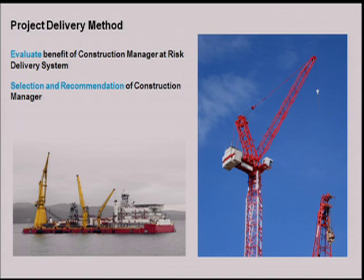So with that, an RFP was issued and 10 firms submitted their qualifications. The design team participated in the evaluations and the interviews in an advisory capacity, leading to the selection committee's ranking of Skanska as the highest ranked firm. Then on August 2nd, City Council approved the ranking and authorized staff to negotiate an agreement with Skanska, which is currently underway.